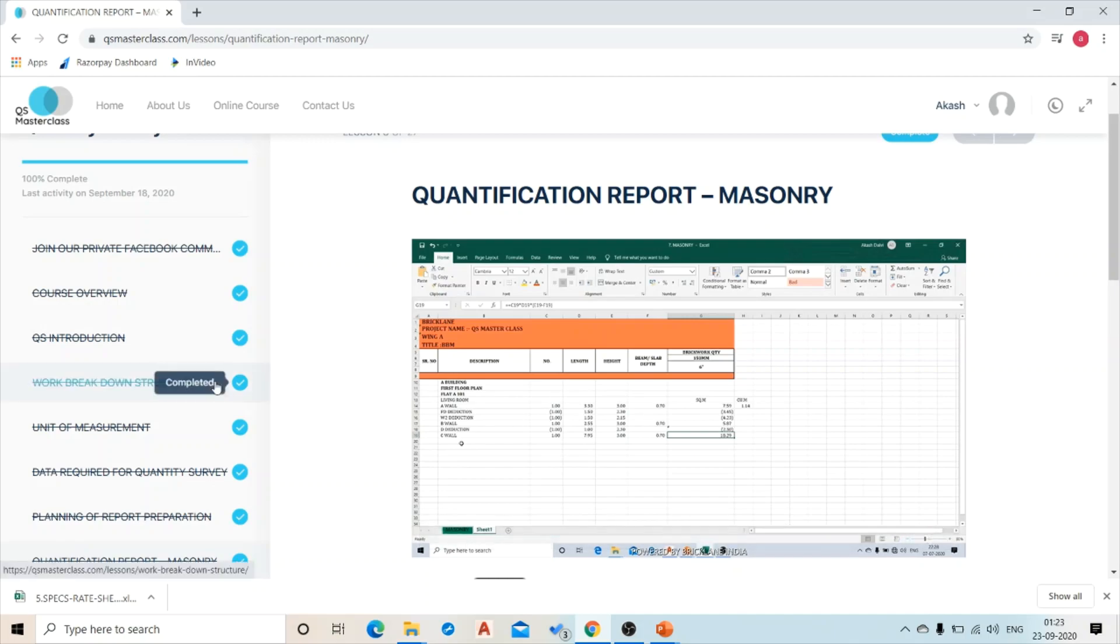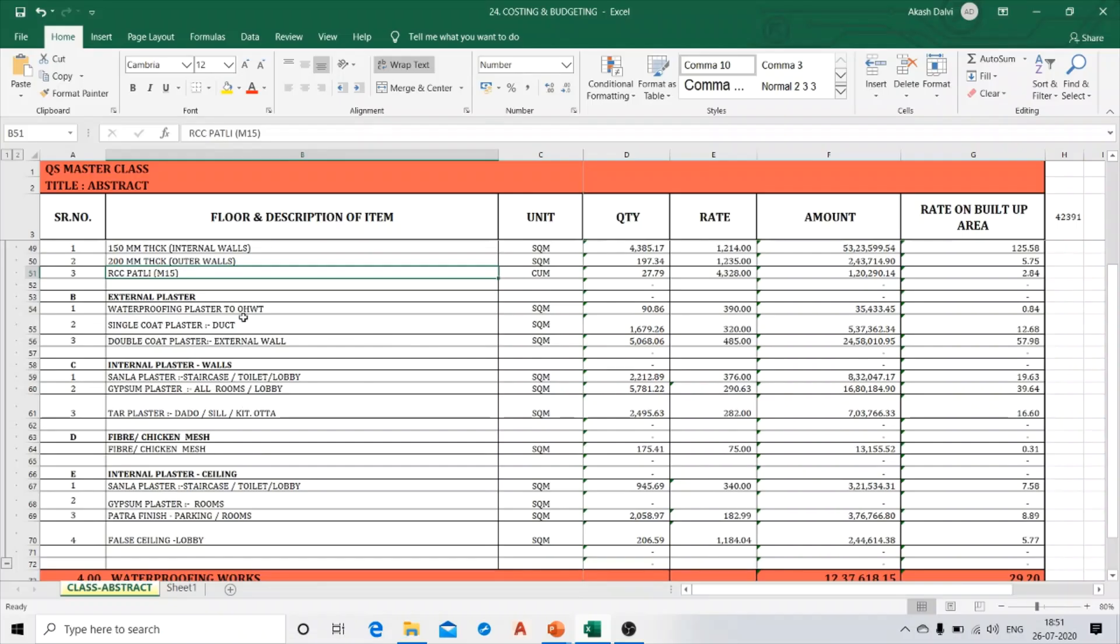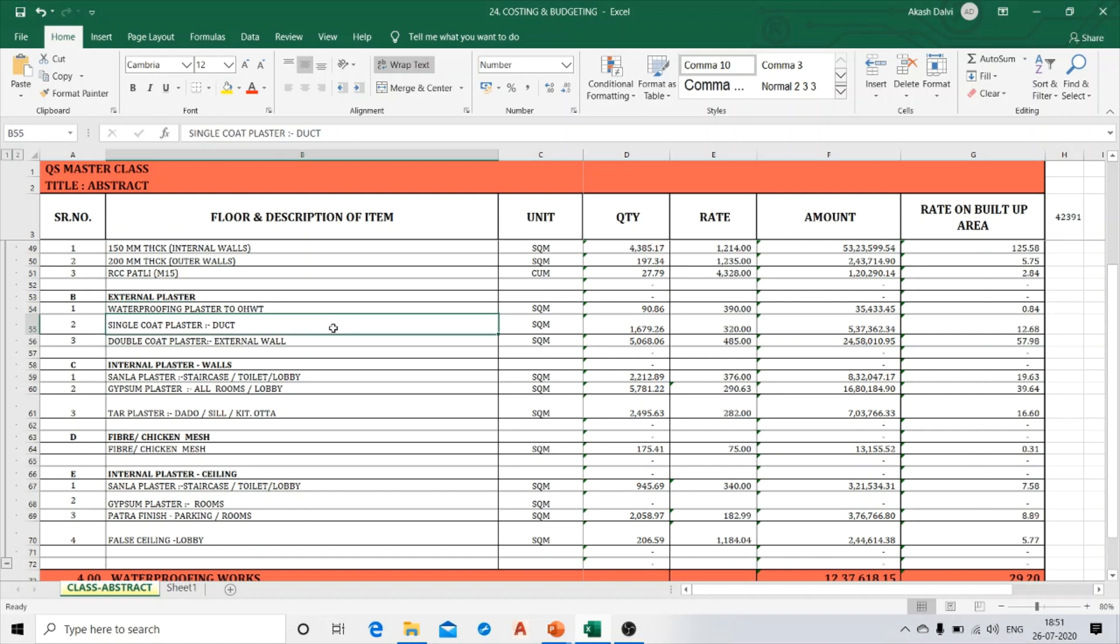Now on the respective bars I have given the cost per square feet of the built-up area of the construction project. Next is your external plaster, waterproofing plaster to overhead water tanks, single coat plaster in ducts.